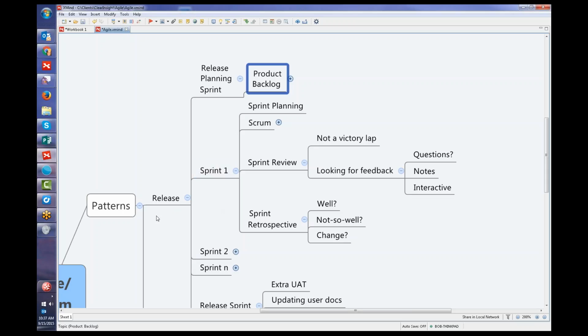So if you think about it compared to a traditional waterfall model, sometimes you could think of releases as milestones. There's a particular milestone that folks are working towards. That milestone is broken up into phases, and then there's features. Now the reason for the different words here is the product backlog is always our list of current priorities. It's not part of a project plan at the beginning that's set in stone. This is something that does change or can change every 2 weeks. And every 2 weeks at the sprint planning session, the team with the product owner decides what stories are going to get done in this particular sprint, all around the vision of completing a particular release.